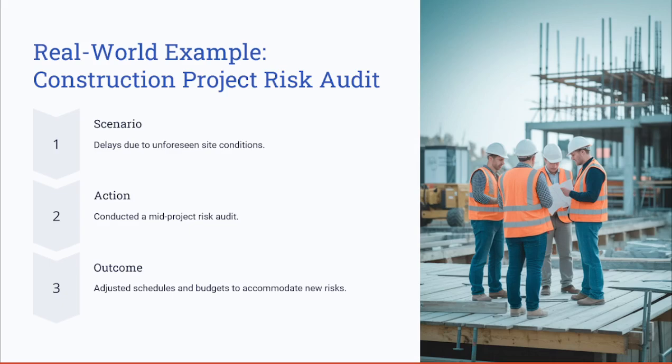And here is a real world example of a construction project risk audit. In a large construction project, unforeseen site conditions led to delays. A mid-project risk audit revealed the need for additional geotechnical studies. By adjusting the schedules and reallocating resources, the project team minimized the impact of these emergent risks, ensuring the timely completion.